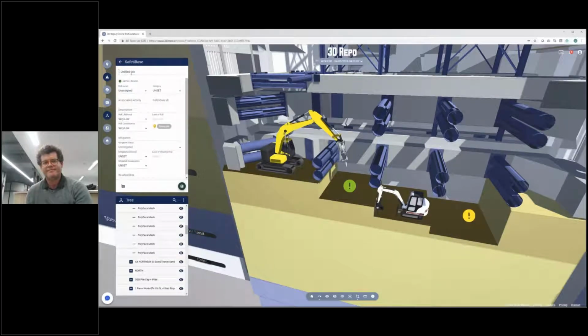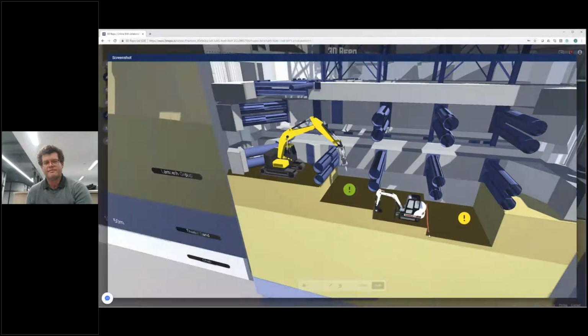And then you can tag your risk. So it sits in a database, and that's there for history. That's part of your audit trail. So you can see who's reviewed it, when they reviewed it. You can assign responsibilities to people. You can mark up like you would in Paint, very simply, and it doesn't need to be too pretty.